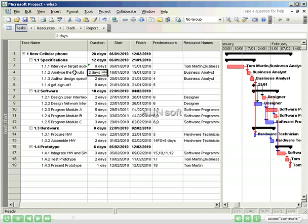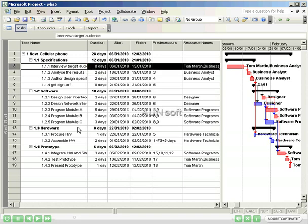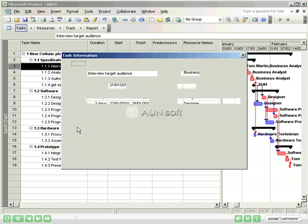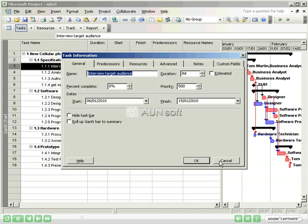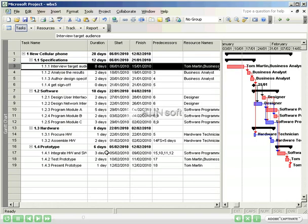It is not uncommon for project managers to record percentage complete in the task information pop-up window and to modify duration and start and end dates to reflect what actually happened. This is a very serious mistake. By doing this, you will lose the ability to assess variance.